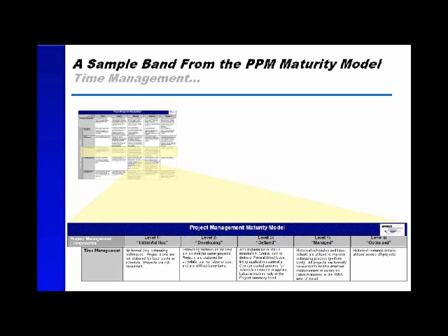So it's pretty common for an organization to come to us and say, we want to turn timesheets on in Microsoft Project. Well, it starts to imply the need to go through maturity levels 2 and 3. Estimating techniques for projects are applied. Projects are statused for schedule. We start to baseline them. We start to have a change control process for how schedule revisions are applied. We go beyond labor tracking at the project summary level. Oftentimes, there's a system in place that's already doing tracking, but it's at the summary level of the project, or maybe the entire project. So these are big challenges.